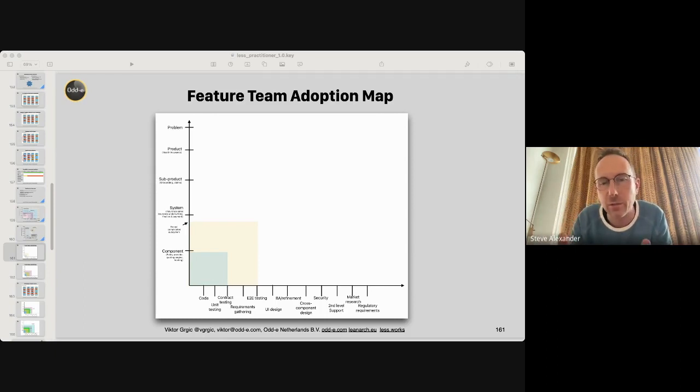So I think there's often this confusion between activities that take place and definition of done. Definition of done is not usefully a list of all the activities that should have taken place, I don't think. I think it's more looking at the outcome or the output, or here is what's changed in developing this feature, and what are the characteristics of this? Does this cover all the different characteristics? Is it maintainable? It's almost like properties of the system being maintained rather than activities that have been completed.